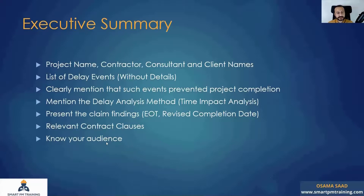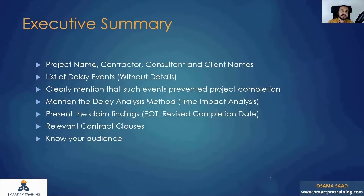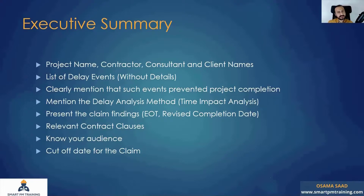Know your audience. A claim submitted to a consultant is different from one submitted to an arbitrator or a court. For a court or arbitrator, you must mention previous revisions of your claim, why they were rejected, what your response was, and why you disagree with the engineer's decision. Also include a cut-off date for the claim — stating that all facts and updates were considered up to a specific date — so a reviewer two months later understands why certain approvals issued after that date were not considered.